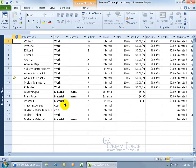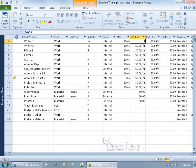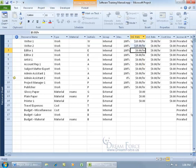Let's come over here to the standard rate column and assign a cost or standard rate for Rider 1. Type in 10, there you go, $10 an hour. Rider 2, 15 an hour, editor will be...